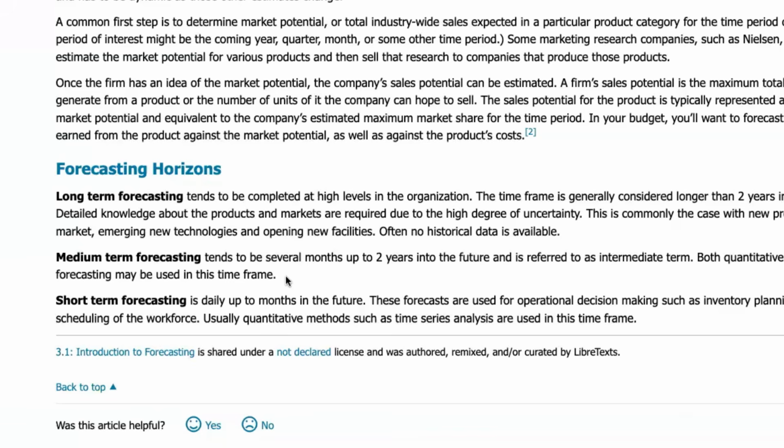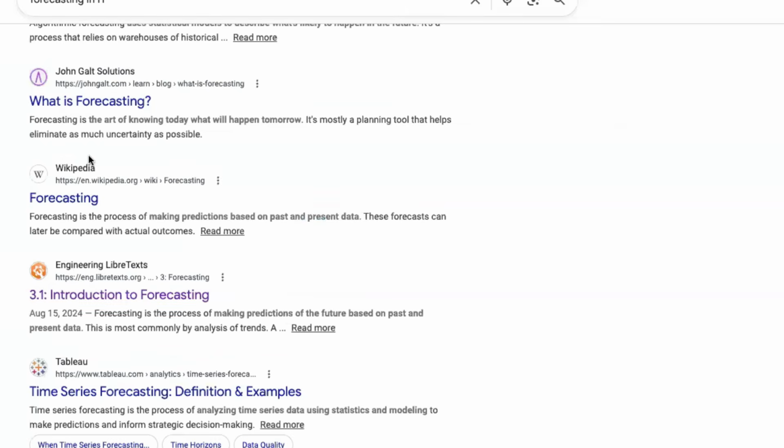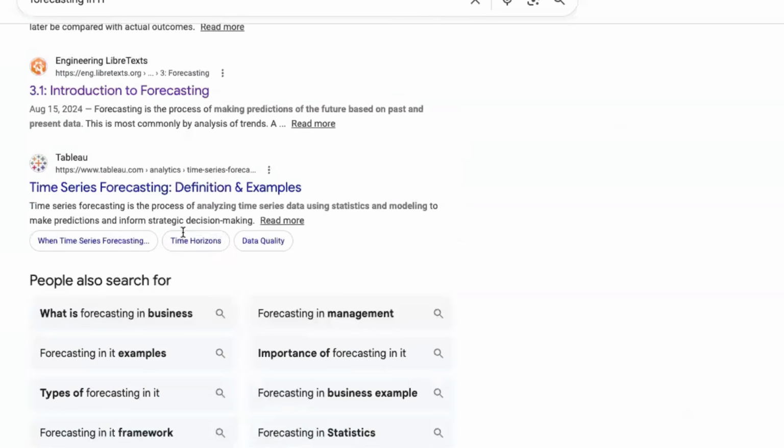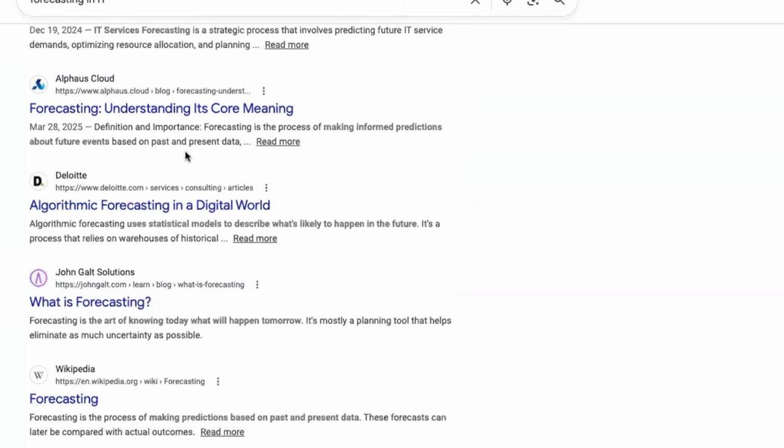By that time we will know what production defects we are going to have and how we are going to fix them. So we'll have that stability. Long-term forecasting means longer than 2 years. So you can say phase one, phase two, phase three approaches. As a BA, what we will do is plan phase one: what the goals are, how many resources we need, and what capabilities we are going to take live. Then phase two: what the market trends and upgrades are. In phase two, the scope can also change based on phase one. Business owners may say, we don't want those requirements, please cut them down, and then give you new requirements for phase two.